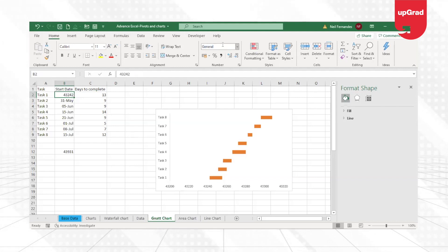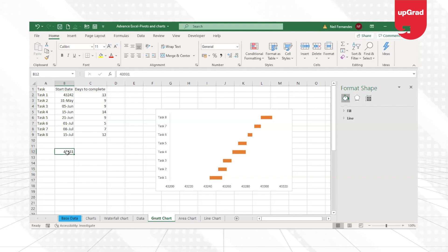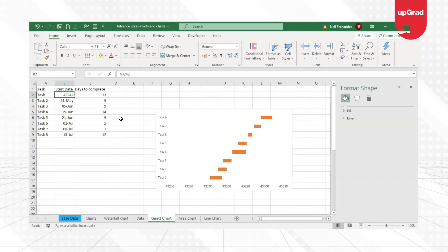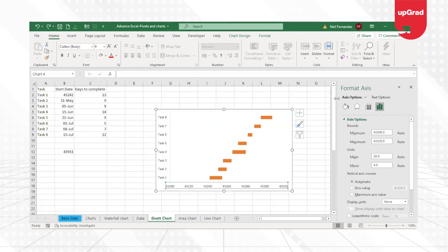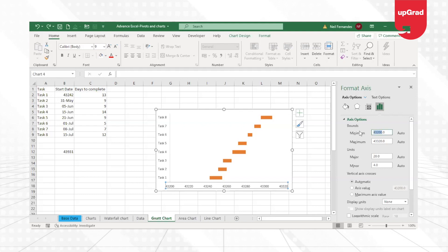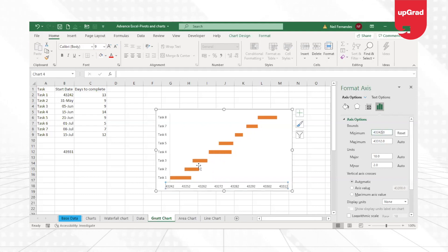So then what I need to do is I need to take this 43,242 and put it in the axis label option here where the minimum is 43,242. So I'll take 43,242 as my minimum value.